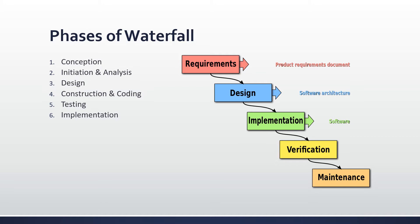Phase two cannot be started until phase one is completed. The phases of waterfall methodology are: first, conception — the idea stage where developers decide what they want to design and why. Then initiation and analysis — gathering and documenting what the project will require, including system and software requirements. Design — developers determine how the software will work and which pieces are necessary to code. Construction and coding — coding each unit and testing along the way, as well as integrating units according to the software architecture from the design phase.